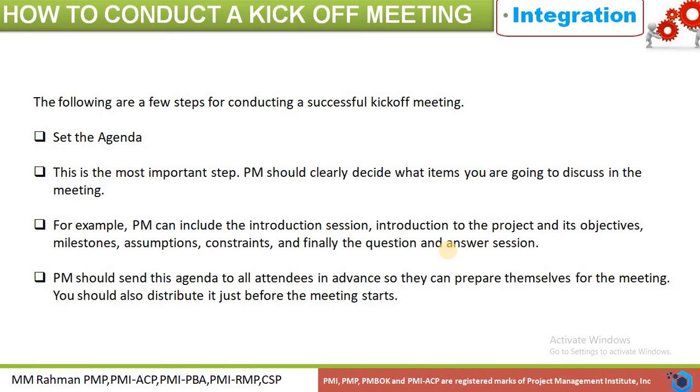Then how will we conduct this kickoff meeting? First we have to set the agenda. This is the most important step: the PM should clearly decide what items to discuss in the meeting. For example, the PM can include the introduction session, introduction to the project and its objectives, milestones, assumptions, constraints, and finally the question and answer session. The PM should send the agenda to all the attendees in advance so that they can prepare themselves for the meeting. As a project manager, you should also distribute it just before the meeting starts.